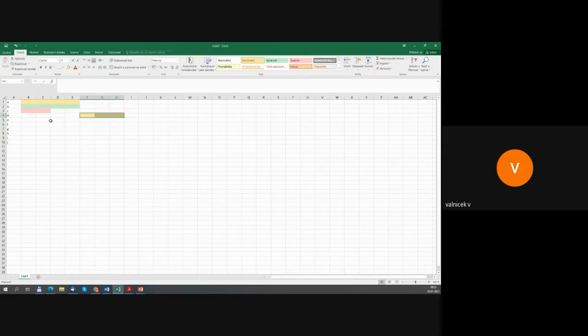The activity E starts at the end of the activities B and C. So we are waiting for both activities to finish, and it takes 10 minutes. It's the same for the next activity, also waiting for both activities, and it's the same for the next activity. So they are starting in parallel. The activity H is waiting for the activity C, and it's for 2 minutes.